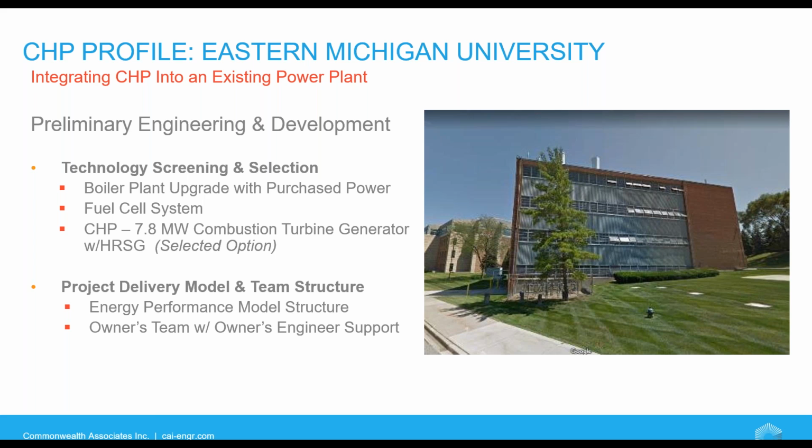They looked at numerous contracting approaches, including a DBOOM, which I don't think Mike mentioned, which is a design, build, own, operate, and maintain contract that puts all aspects of the project on a single entity for an agreed price for a set period of supply. But you can also look at, as the owner, maybe you want to hire your own engineering firm, bid out the installation, and potentially bid out the equipment purchase to a contractor.